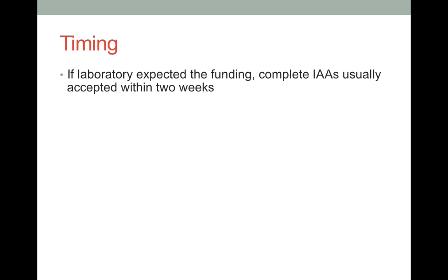Timing is very laboratory dependent as the process and capabilities vary greatly from lab to lab. The requesting agency should follow up after 2 weeks if their funding has not been accepted. Work for the intelligence community always takes longer for DOE to accept due to DOE requirements for the work to be approved at DOE headquarters. The IC should work directly with DOE headquarters to make acceptance of their work as smooth as possible.